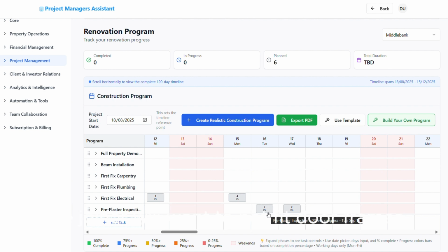The joiner will want to not fit door frames at its first fix stage because it's easier for a joiner to fit the door frame and the door at the same time. Do not let them fit the door at first fix stage. It's just going to get, or they are just going to get damaged. There's too much moisture in that house with all the plastering going on. They're just going to swell, twist, and warp.